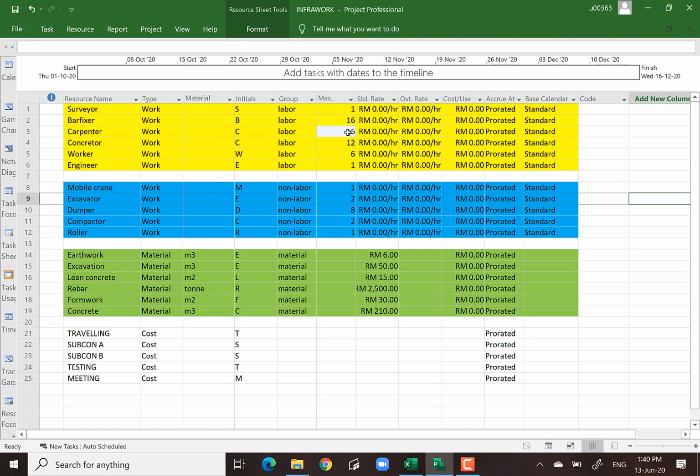But again, I do not want to go to this one directly yet. Now let's go back to the original. Okay, this is the issue. How can we solve resource conflict? There are multiple ways, and I will show you one of them. First thing first, we need to understand when our project is going to be completed. What would happen if we do not want to add the resources? We just simply push the activity so that it will not cause any conflict.